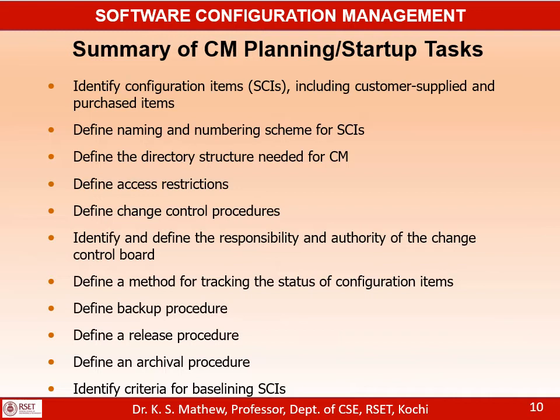When you release a version of a product, you need to build that version, taking the correct versions of files in order to build that final version of the product. If you take a wrong version of a file for building the product, that will create a problem in the product. So, building and releasing a version of the product has to be properly controlled, and you need to have a clearly defined procedure for release, and that is also part of configuration management planning.